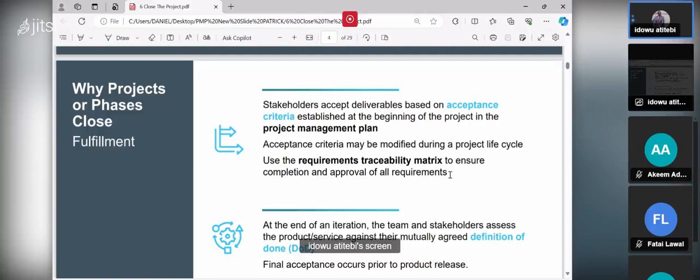And I say go and look at the approval. Are you not the people who said I should do it like this? You approved that I should change it from blue to yellow or yellow to blue. So subsequently, nobody comes and accuses and says why. Or maybe you say all the doors I want to fix, I want a door that you can use a smart card to open. In that case, you need the requirement traceability. You trace back the requirement to the origin.